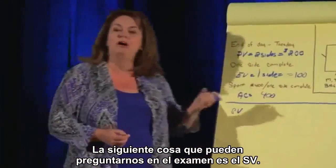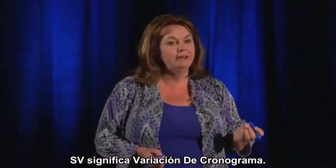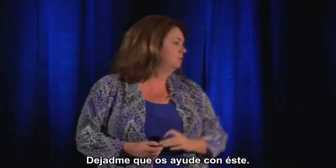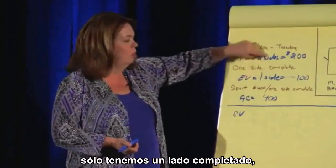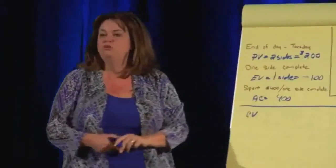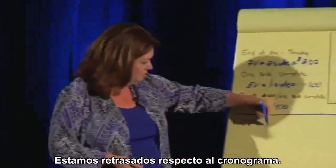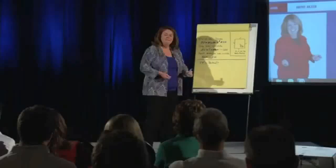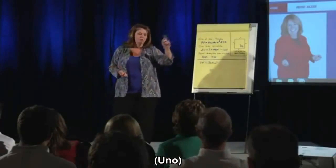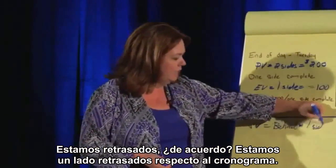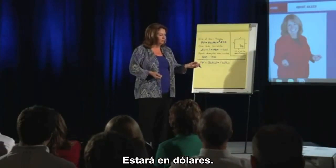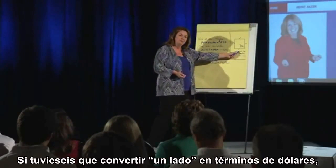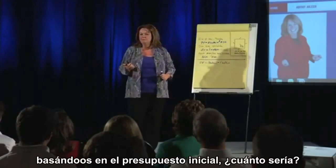The next question on the exam might ask about Schedule Variance (SV). It's the end of Tuesday — we should have two sides complete but only have one. We're behind schedule by one side. Converting that to dollars based on the original budget, that's one hundred dollars behind.